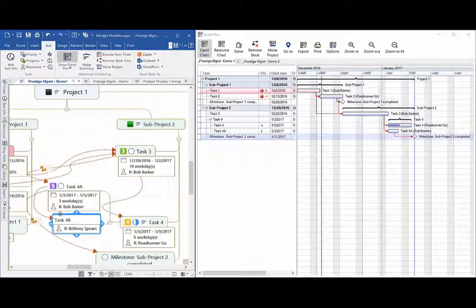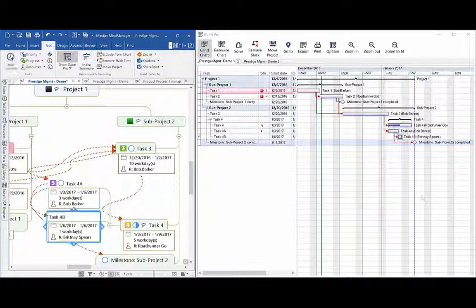It actually is not gone from the map. It just took the start and due date out. And the start and due date, if you recall, is what is required for an item to show up in the Gantt chart and MindManager Gantt functionality to begin with. And that's the same as in regular Gantt or Gantt Pro. Now, actually, we want some dates on that, so I'll move them back on here. And all is well in the world. We've got task 4B again here, and I'll make it a little longer of a task as well.